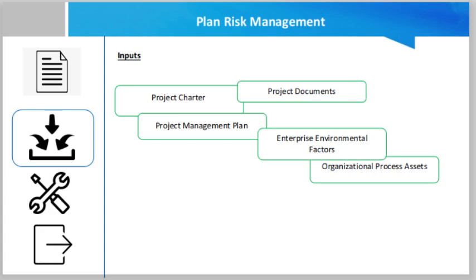Project documents that can be considered as inputs include the stakeholder register, which contains details of the project stakeholders and provides an overview of their project roles and their attitude toward risk. The enterprise environmental factors include the overall risk thresholds set by the organization or key stakeholders. Organizational process assets include the organizational risk policy, risk categories, common definitions of risk concepts and terms, risk statement formats, templates, roles and responsibilities, and authority level.